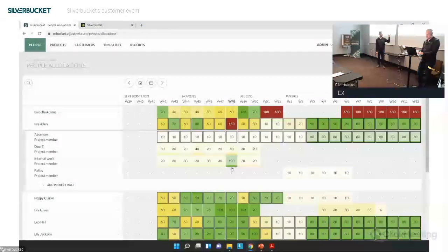The background color will show the line's allocation level, and the bottom border will show the total allocation. So just looking at that, you basically see if there's still room. And then we are bringing more data rows under each line to show even the exact numbers of the free capacity.